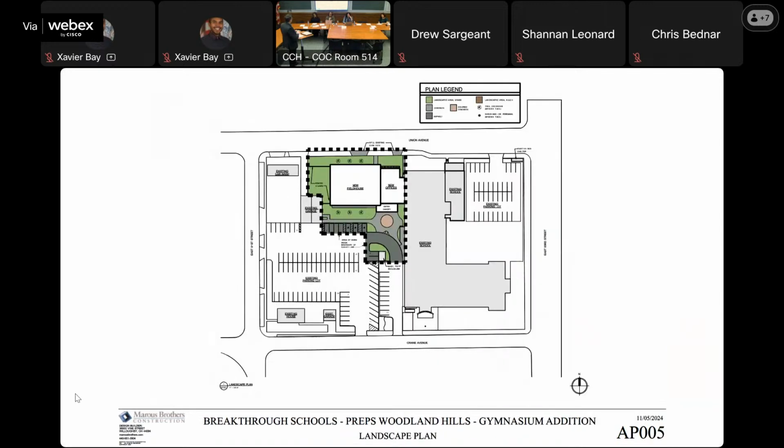Okay, so this is the overall site plan, the area within the dotted line, and that's our scope of work. Outside of that, we're essentially leaving everything alone. I will say, I just met with the fire marshal right before this. We have gone through PETFOP, got some comments about fire access. So we are working through some of the details of that. We may be doing some modifications to some of the curb cuts on the south and west just to increase the radius for fire trucks. Other than that, everything outside this dotted line we're leaving as existing.